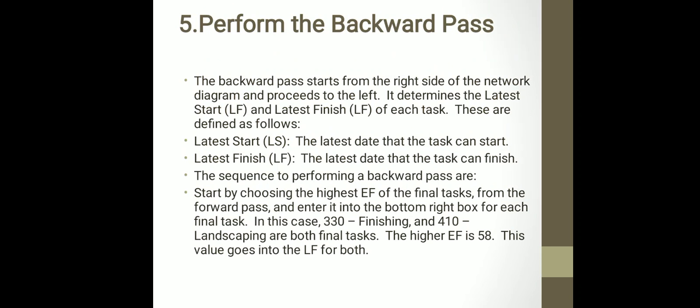Next is perform the backward pass. It starts from the right side of the network and proceeds to the left. It determines the latest start, which is the latest date that the task can start, and the latest finish, which is the latest date that the task can finish.